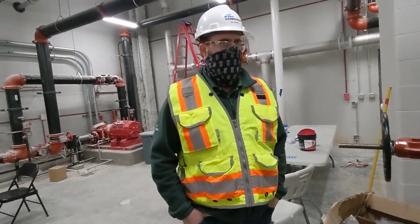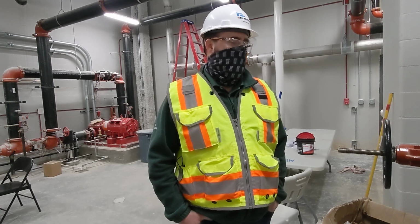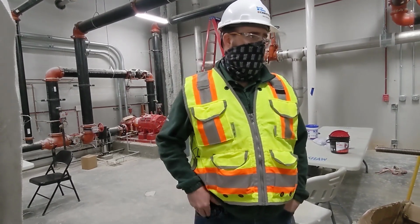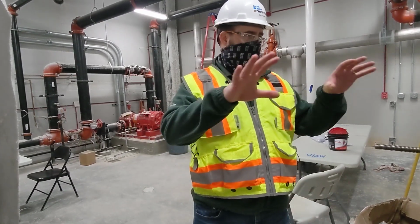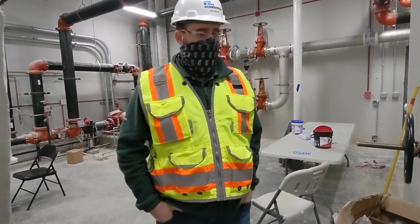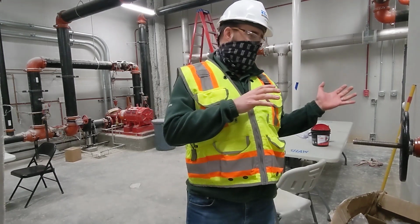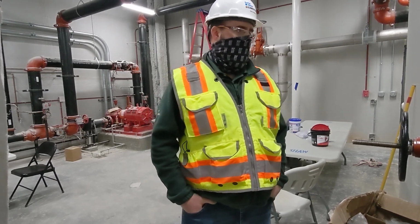Sure. So really, we don't treat it any different than any other job. Obviously, safety is of utmost importance. One thing that we did do on this job, though, to even mitigate that further, is go to prefabrication on a lot of these components. And what that allowed us to do is have the workers working at chest height versus being up on lifts and ladders. And then that in turn eliminated a lot of trash, lifts, and ladders on the job, and less men because the work's off-site. So inherently, that creates a lesser environment for incidents to happen.